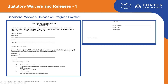You write down who the check is coming from and the amount of the check — the amount you're going to receive in exchange for work and materials performed through the through date. It'll be this amount, all claims released to that date, and then who the check is going to be paid to. There are some exceptions: it doesn't cover retentions, so you don't have to put that into the amount, and also extras for which the claimant hasn't received payment — things like disputed change orders which have not yet been processed.